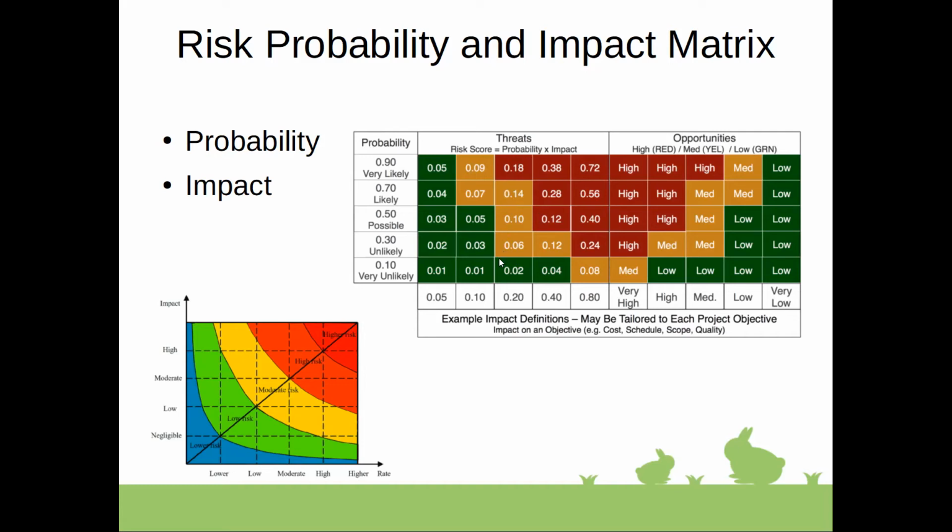And threats with low probability and low impact can go to the color-coded schema. Basically, you can put color codes on low impact, low probability, and put them, let's say, green, put yellow on medium impact, medium probability, and put red on high impact, high probability. And for opportunities, it would be reversed, basically.